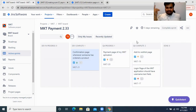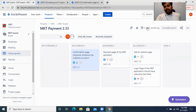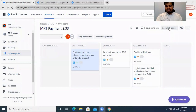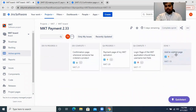You can make the sprint duration whatever you like — for example, 100 days for the first sprint and 50 days for the next, though nobody really does that. The remaining days counter will count down: five days remaining, then four, three, two, and so on. The reason it shows five days is that most IT companies do not work on weekends, so it only counts weekdays. If you try to complete this sprint again tomorrow, the same logic applies — incomplete tasks will carry to the next sprint unless they are moved to the 'Done' position.